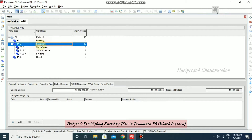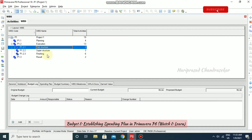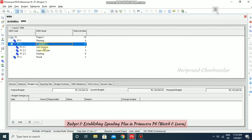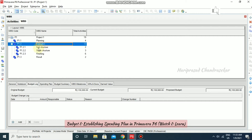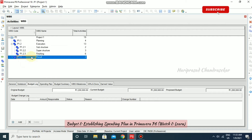For Execution, I am putting 21 lakhs 50,000. If you want to split this into Substructure, Superstructure, and Finishing you can, but I have added everything under Execution. For Result, I have another 12 lakhs original budget.